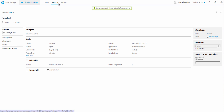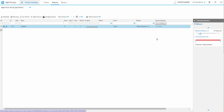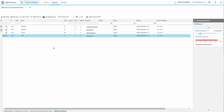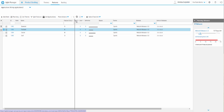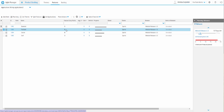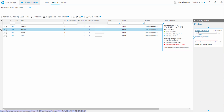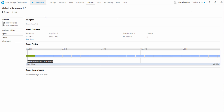It says that was saved. Return to features and this will update in our release. I went ahead and created a few more features: Football, Soccer, and Golf. I assigned story points with a couple of different values. On the right side we have a pane showing our Website Release Version 1.0 with story points remaining. We're over-planned by 22 story points because our total capacity is zero, so let's fix that by going into configuration.